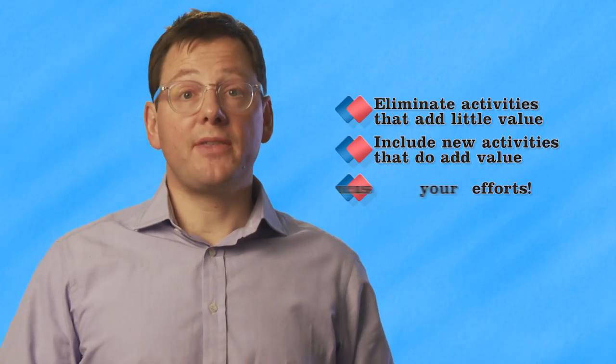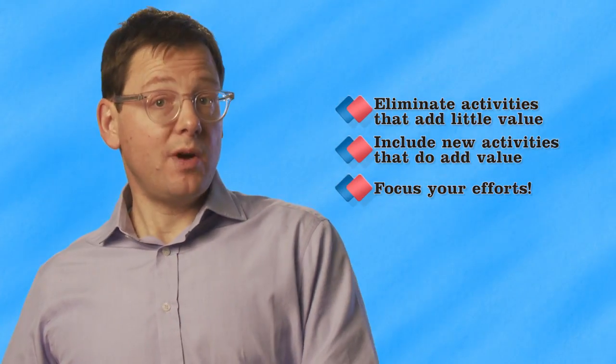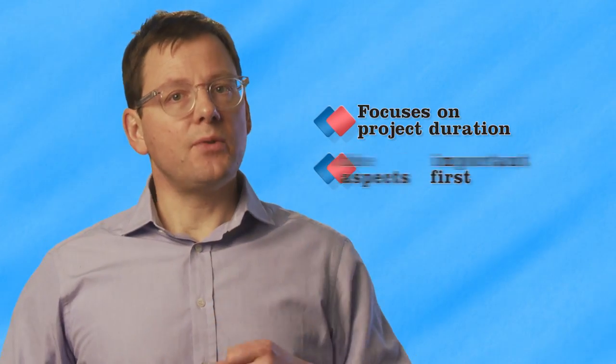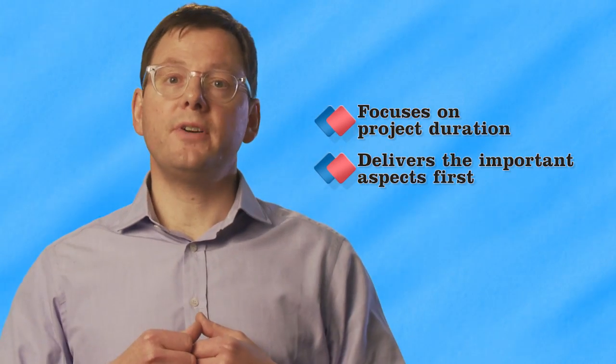Using this thinking, it's possible to create a hierarchy of importance from essential right down to unimportant, focusing efforts where they'll add most benefit or eliminate most waste. Now again, this sounds obvious, but it can have some profound implications. For example, let's think about how this might impact project work. Compared to a traditional project which says, what do we want, and now let's estimate how long it'll take, an Agile project says, how long have we got? Now let's deliver what we can, the most important stuff first.